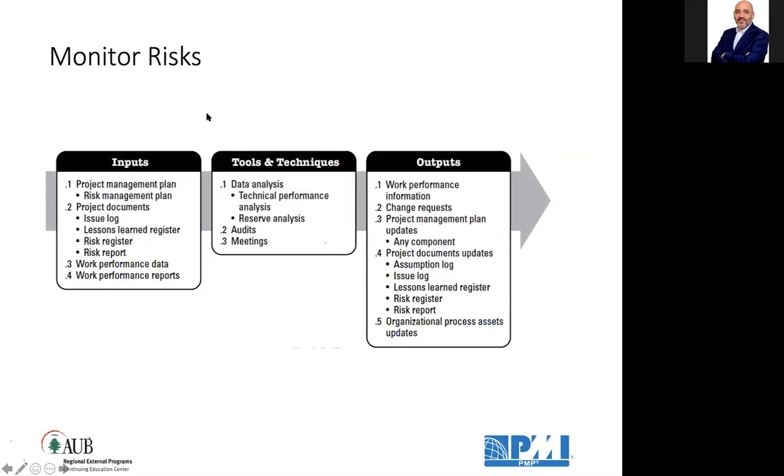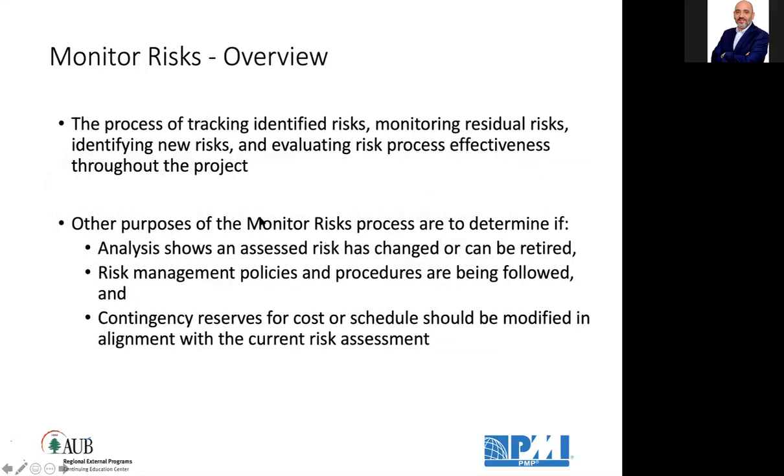Monitor risks. Here I'm tracking the identified risks. I'm monitoring residual risks, I'm identifying new risks, and I'm evaluating the effectiveness of my risk management processes throughout the project. Other purposes of monitor risks, mainly this is a monitoring and controlling process, remember, are to determine if analysis shows an assessed risk has changed or can be retired from the risk register.